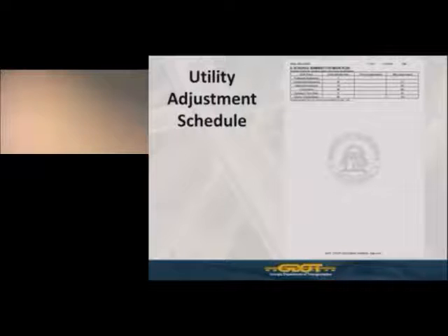And then if you see on section D, the summary for the work plan, it shows preliminary engineering, total days 7 and prior to project award, which now would be prior to utility NTP, but it says 7, which would be normal expectations. And then construction engineering is 30 days, and it's after project award, it ends at 31, which would be day 1 plus the 30 days is 31, and so forth, for a total of 132 days of non-concurrent activities needed in order to complete this work.